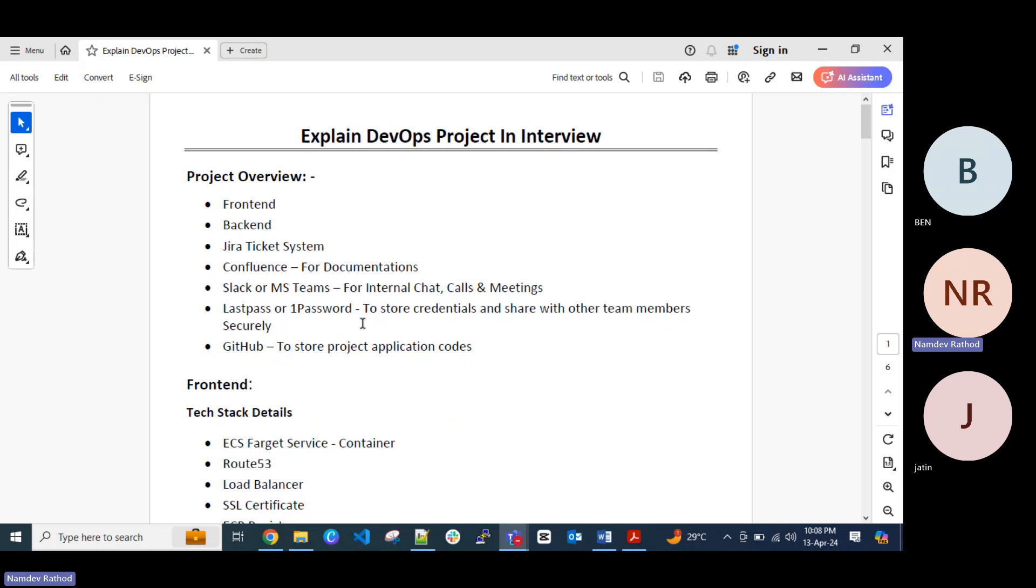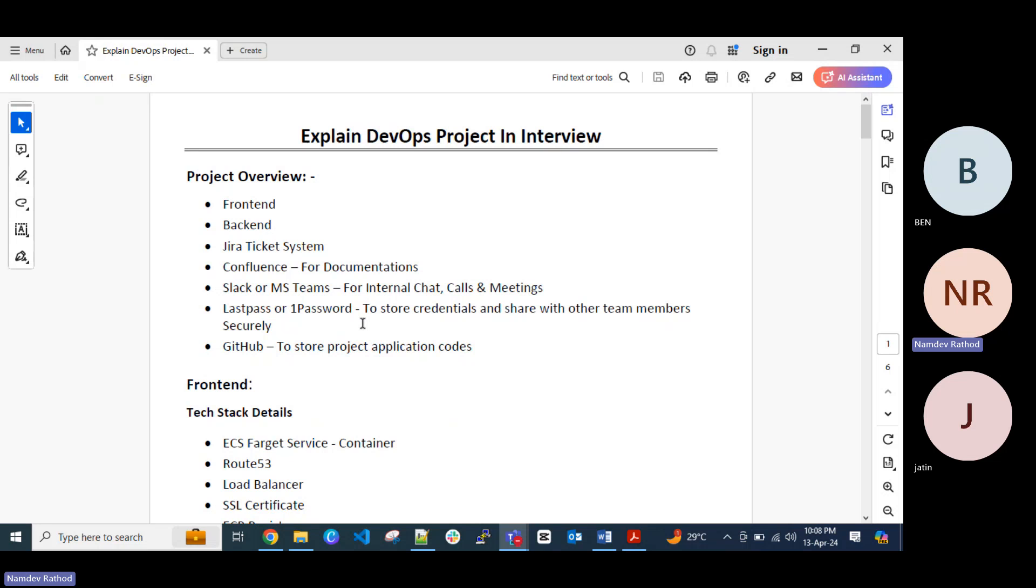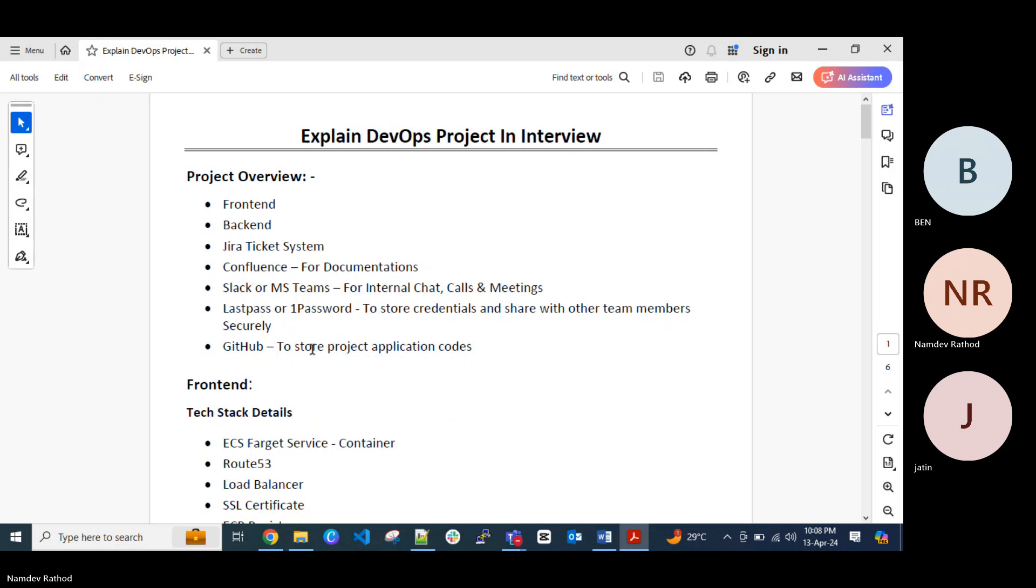And you can track the progress by moving the Jira ticket. In the Jira ticket there is a workflow, when you create the new ticket it will be ready for dev. Then you need to move to in progress once you started working on that requirement. And once you are done with that work then you can move to code review, and then finally you can move it to the release or done status. That is a part of the Jira ticket system.